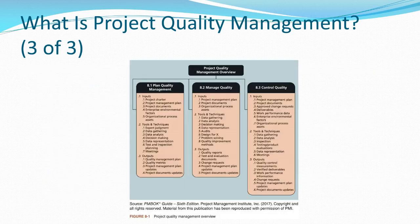Here's a great example of what areas fall under project quality management: planning, managing, and controlling. The inputs right from the get-go include our project charter and our project management plan — which is an input to all of these areas. The tools and techniques all involve gathering information and data, and we're putting out outputs from all of these areas. The outputs are going to be methods of measurement, maybe even changes to deliverables or our project management plan — particularly if we find a method of managing quality was not working or we were not accurately able to determine what it was we were supposed to produce.